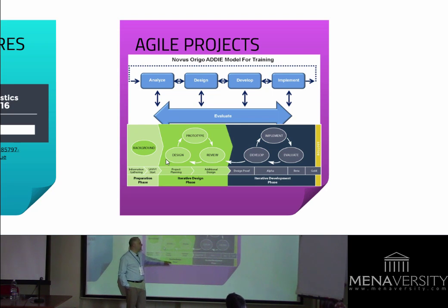We have the design phase. It becomes iterative, where we design only chunks, and the SMEs are included here, and we directly pass the chunks to the developers to develop the content while we're designing other content, et cetera. This is where you can get directly into a prototype or design proof very fast, alpha, beta, and then you start getting the gold.